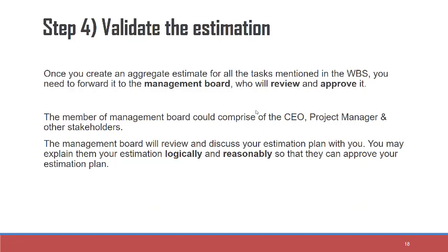Finally, we have to validate the estimation. So all the team members who have provided their estimation, their estimations will be validated by the higher management and they will be approved. Then we'll start working. So let's say you have given that, okay, fine, I need this much time. So your manager will be reviewing it and they will come back with suggestions that yes, I think you need more time here, or I think you have put in more time, you should be able to complete it in a lesser time. So it will be validated, it will be given a go ahead, and then you'll start working on it. So that was all from the test estimation session.